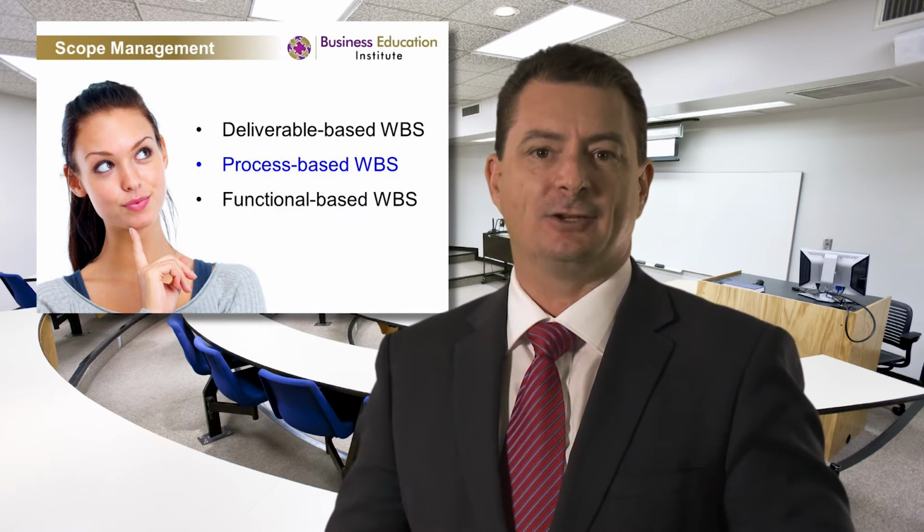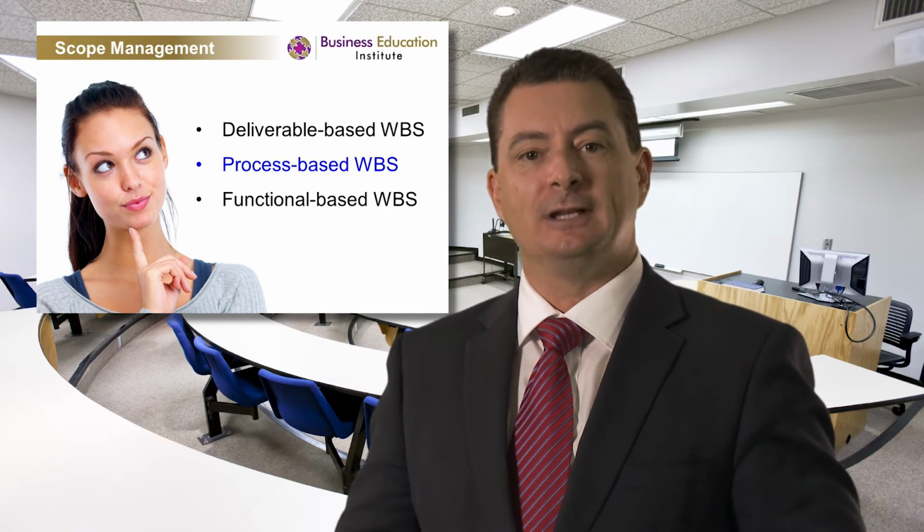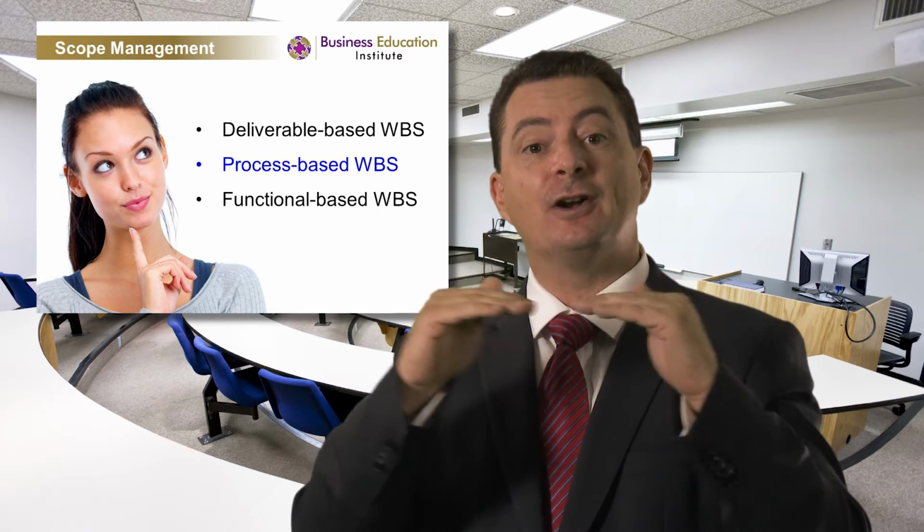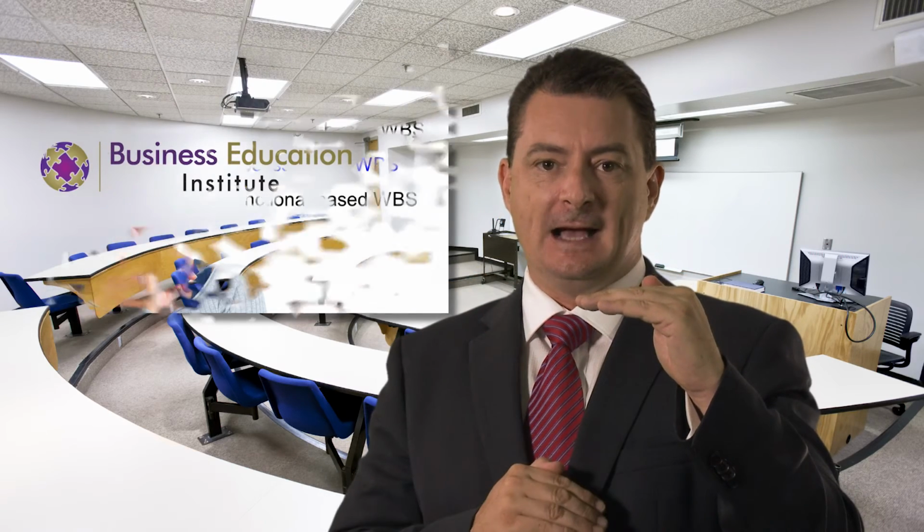The work breakdown structure itself has 3 different types of work breakdown structures. The first one is called deliverable based. And what we're talking about here is defining the activities for the grouping of the tasks. See, the activity doesn't mean anything other than allows us to better understand the structure of the task we're producing. For example, the report was a deliverable based. But if you were going to build a construction site, you might have building, car park, swimming pool, and those activities are the deliverables themselves. And then we have the tasks under each that then explain the whole process in creating those deliverables.